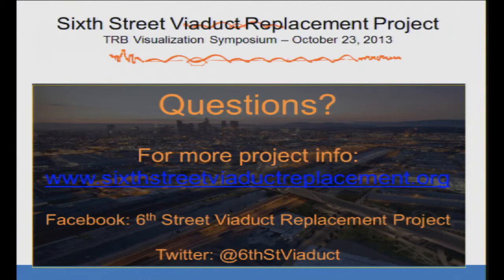Yes. On both your projects, did you use any sequencing software like Synchro or Navisworks? This one was all primarily done in Max. We haven't done the Navis work yet on these projects. On the Huey P. Long, it was more of a visualization tool. We didn't take it into a true model with every single detail; that was beyond the scope of what we were doing at that time. But they did use that model to confirm how they would sequence the barge movement as well as the movement of all the jacks that were needed. That's what it was primarily used for.